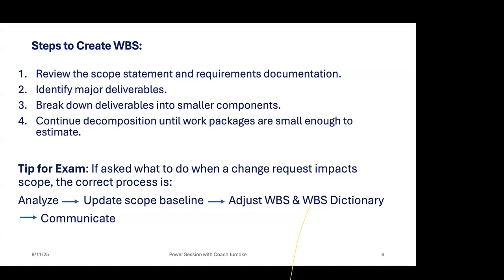Usually people will go for just effecting the change. No. You know, for every change that comes up, you must log it. You must log it in the change log, just as you have an issue log. So don't be in a hurry to say, oh, but this one will not affect us, then boom, you pick the answer. It should follow this: you analyze it. You update the scope baseline if it will affect the scope baseline. Then once it affects the baseline, it would have a reflection in the WBS. And once it does, you have to update the WBS dictionary.